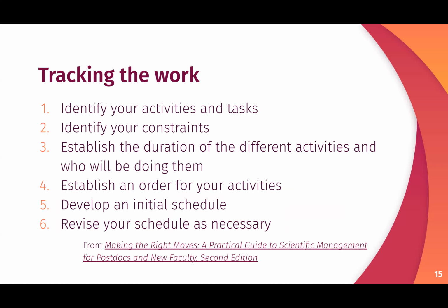You want to establish what's the correct order for things to happen. What do you need to have completed before you can move on to the next step? What is a prerequisite? What could be a co-requisite? You want to make sure that you know what parts are integral for you to be able to continue doing the project. And then you will create an initial schedule, which will not be the schedule that you will end up with, because you will be revising it over and over until you're done. Because again, things happen, and you think you have a grasp on it, and you don't.